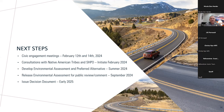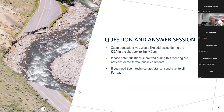Next steps: we had the meeting on Tuesday, we have this meeting tonight, and we're going to be consulting with tribes. We'll begin to develop an environmental assessment and identify a preferred alternative based on everything discussed and feedback from partners and stakeholders. We plan on releasing a draft environmental assessment for public review in September of this year and issue a FONSI/decision document in early 2025. By that point we should have the soils data needed to make a more informed decision.